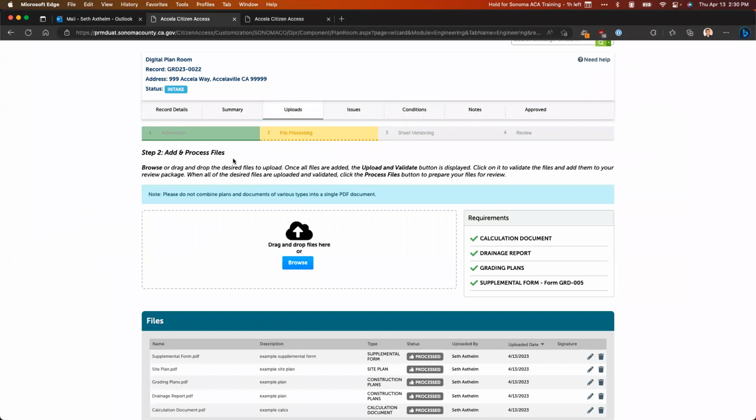And this is a question that's come up in our own minds too: if you're resubmitting and let's say your initial submittal had 12 sheets and your new one now has 14, how do you address that in the page numbering? Ideally, you keep the previous sheet numbers intact in the resubmittal. And if there are additional sheets being inserted, potentially use a nomenclature of 1 or .a so that they get inserted in the proper location within the sheets. But leave the previous sheet numbers unchanged, and use some sort of a suffix if you need to insert them. Otherwise, those sheets can be inserted at the end of the sheets that were previously submitted. Thank you.